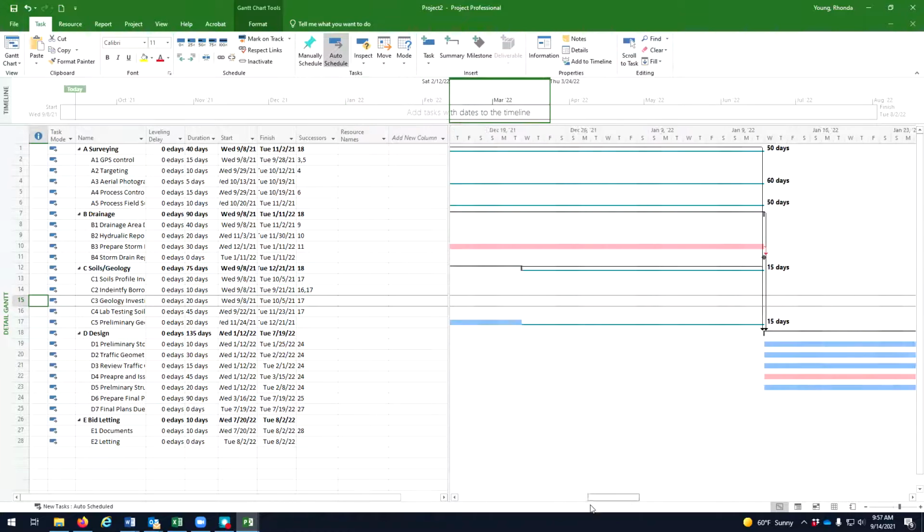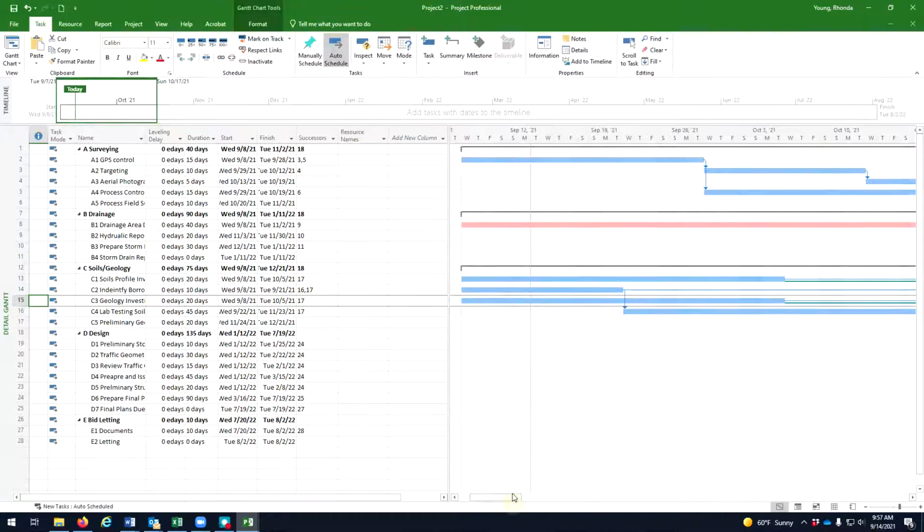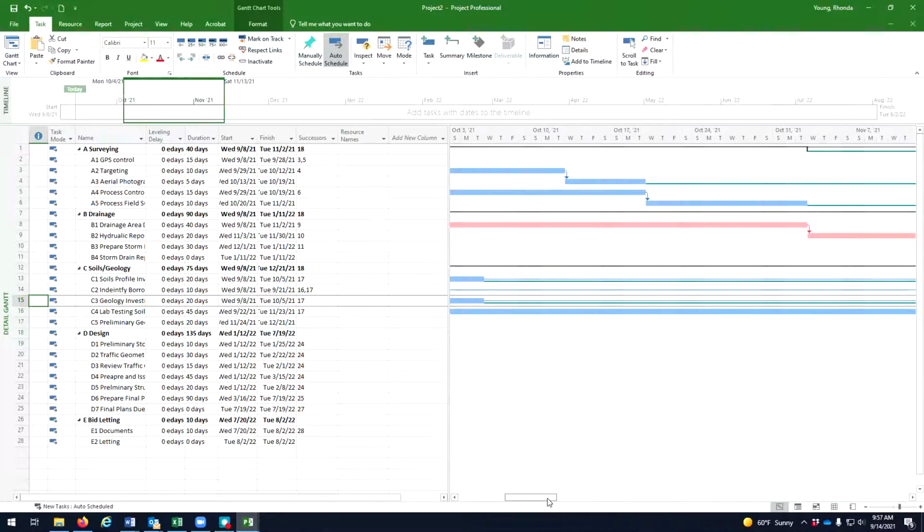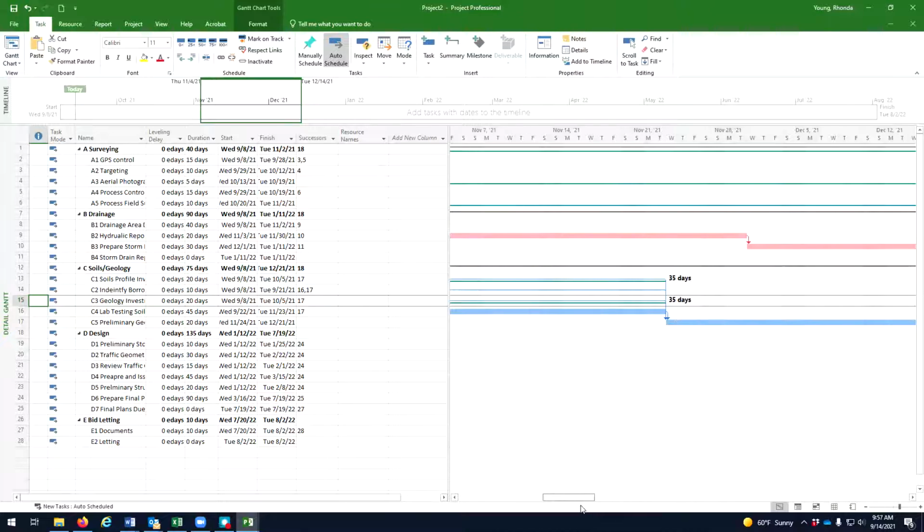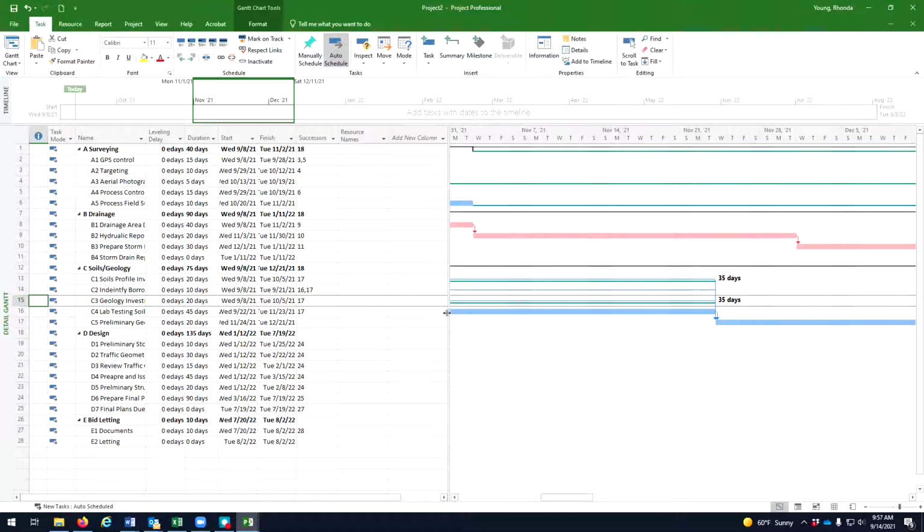These are the individual tasks, subtasks, that are controlling the overall duration. When we talked about float a little bit earlier, that's where you have extra time, and so these tasks can move without impacting the final date of the last deliverable. What this does is it puts that critical path, right, and you can very quickly see.